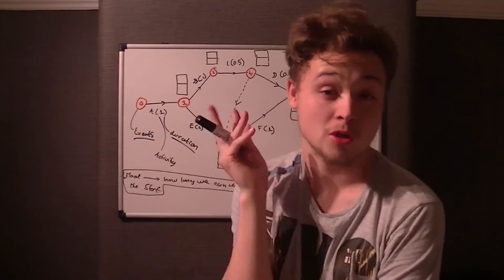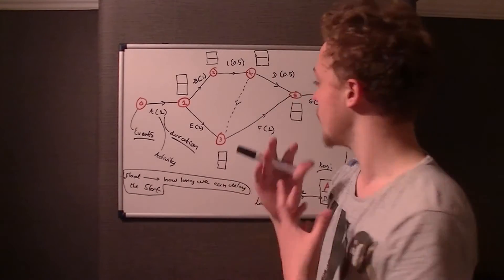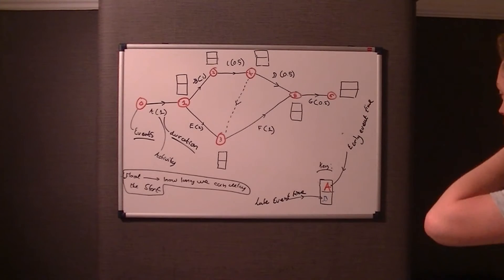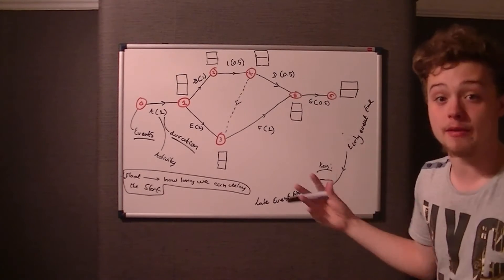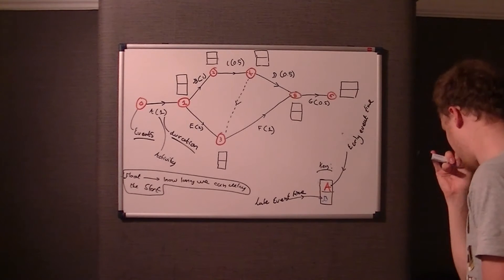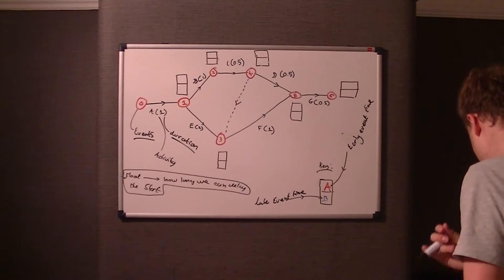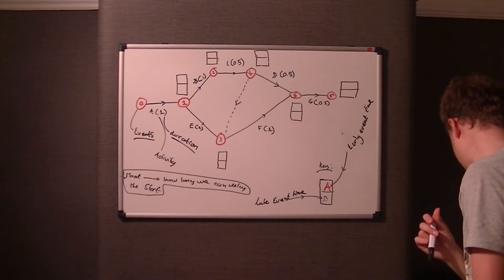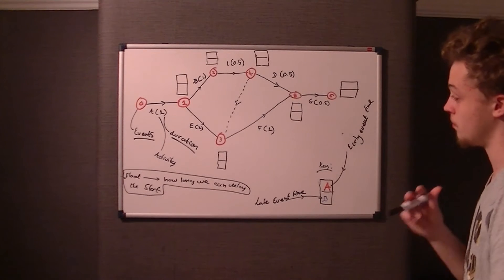They will always draw the graph in D1 — you will never have to redraw the graph in the exam. The Early Event Time is the earliest time you can arrive at the event with all incoming activities completed. The Late Event Time is the latest time you can leave the event without extending the length of the critical path.